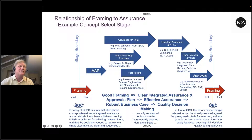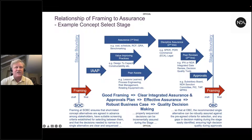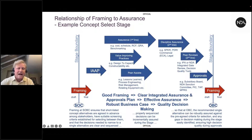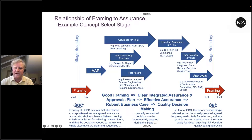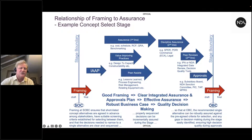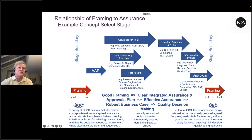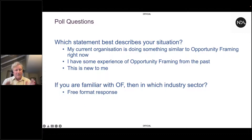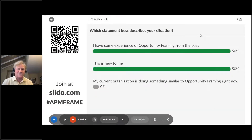Framing, if done at the start of the stage, essentially enables the creation of an integrated assurance and approvals plan, which then leads to a set of assurance building up to a business case, another gate, and then framing is done again. Framing is not a piece of assurance, but it certainly enables a good IAP to be written and therefore good assurance to be done. I'm going to pause now and ask for the chair to come in and put a couple of poll questions to the audience.